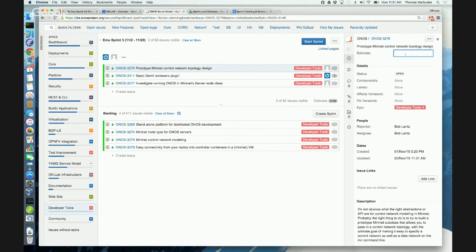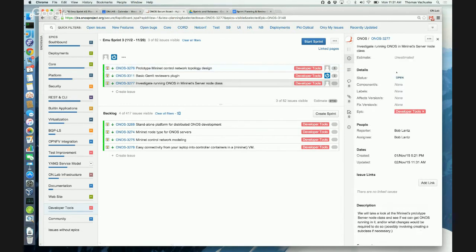Roughly speaking, would you be able to assign a size to both of these? I'm not entirely sure what the size means, but I think they're both 5s, which I think is one week, and my third week I'll be at a conference. All right, sounds good. Roughly speaking, that's about right in terms of your story points versus time. I don't necessarily like to get too stuck on that because it can cause people to overthink it. But as a rough wet-thumb-in-the-air estimate, that sounds good.